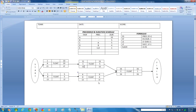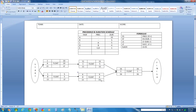Let's solve for D. D's latest finish time is going to be E's latest start time minus 1. So its latest finish time is going to be 15, just like activity C. So 15 minus 4 plus 1 is going to be 12.